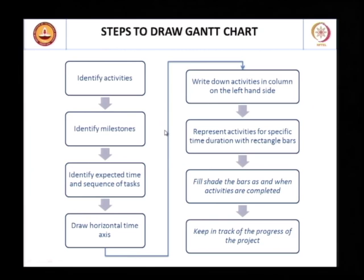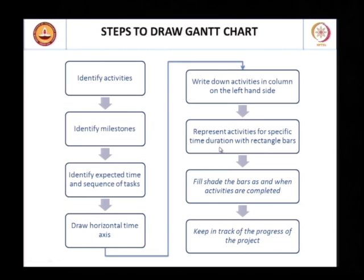To summarize, when we want to draw a Gantt chart, these are the steps: identify activities, identify milestones, identify expected time and sequence of tasks, draw the horizontal time axis, write the activities and represent them with bars or milestones for the specific time duration required. The last two steps are to fill in the bars as activities are completed and keep track of progress.